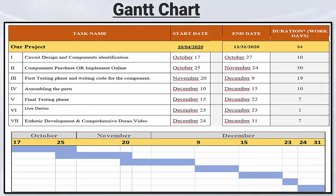Next, the timeline used is a project management tool to illustrate how the project will run in terms of planning and scheduling. Indeed, this tool is a Gantt chart. As you can see from the screen, all the activities have been assigned a start date as well as an end date, in which specific durations must be respected. For example, the time taken to purchase the components must not exceed 30 days.